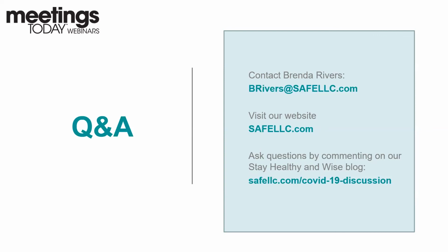Start with the business purpose. What's the business purpose of the event? We agree that if we have low attendance, well, what does that mean? What is low attendance? How low can it go before it's not going to give us an ROI? You have to chart it, and you can't just throw all those ideas at your decision maker. You have to craft a very focused vulnerability assessment. And I have a sample vulnerability assessment, which you can model yours after, and you can say, here are all the factors we need to look at, and how do we rank? You can even rank it and say our vulnerability is ranked very high. And so if we can't have those, then at what point do we decide when we know that we're not going to get this attendance?